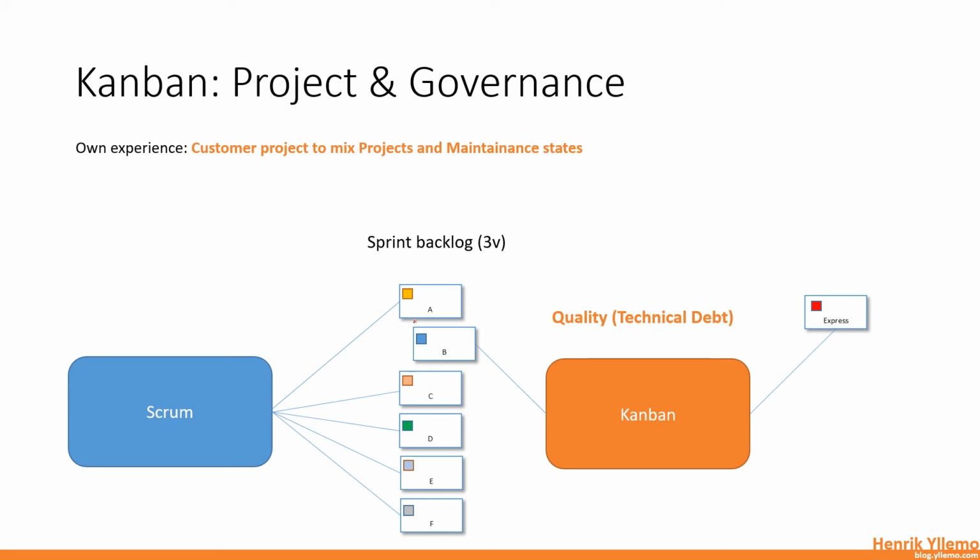So we had an allocation within the Scrum sprints assigned for Kanban tasks. We had a Kanban backlog as well, and that means that we can pick off that backlog, but in case something new comes in, like a support ticket or something like that, that's managed within the Kanban flow, within the Scrum flow, because the team was really doing new development and maintenance at the same time.